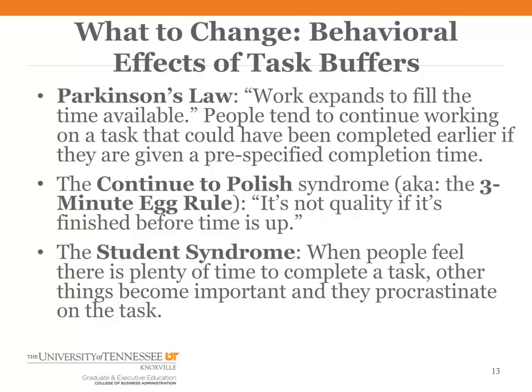They behave in ways to complete the task in the time allocated. And if something goes wrong, it may take even longer. So by being prudent, by building some slack into the task time, you have ensured that a task that had a 50% chance of being completed in 4 weeks will take at least 8 weeks.